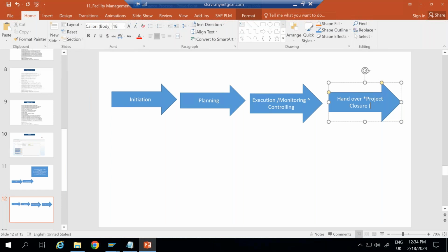Or let's say you don't have land as of now, so you need to procure the land, and even before procuring, you need to do the area analysis, to decide in which area you need to construct this. Then you are buying the land, and then it goes for legalization, and once legalization is done, you are hiring a consultant and giving the complete requirement to the consultant, and the consultant suggests these steps. The designer provides the design, and based on that it goes for the next level of approval. Once it is done, then it goes for the next level of draft, cost, planning, and material. So these are some normal activities which we are managing here in the initiation.